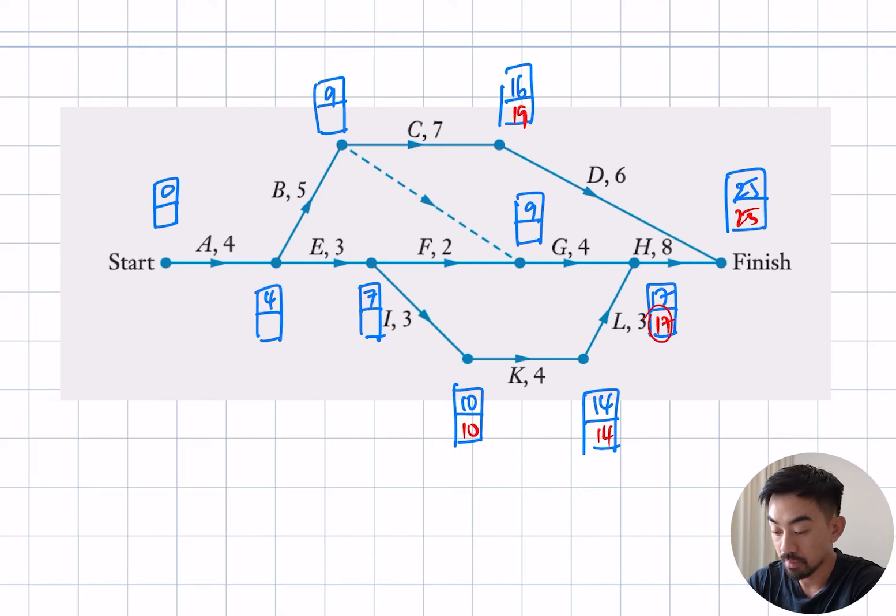17 minus 4 is 13. Need to make a decision. Is 19 minus 7 smaller than 13 minus 0? Well yeah, by 1. 19 minus 7 is 12. In the middle, 12 minus 2 is 11 or 10 minus 3 is 7. So 7 is smaller than 11. Okay, 12 minus 5 is 7. 7 minus 3 is 4. So that is 4 and 0.